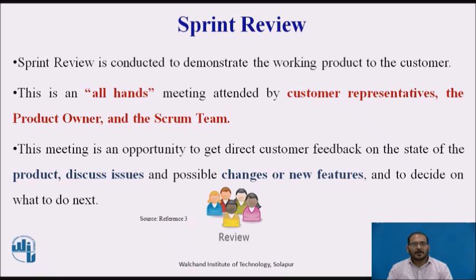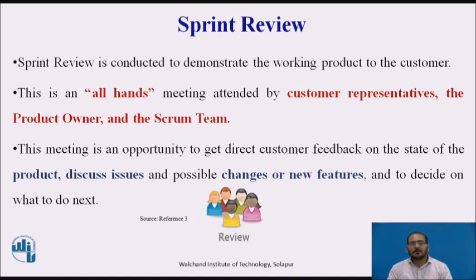At the end of each sprint, a sprint review is conducted to demonstrate the working product to the customer. This is an all-hands meeting attended by customer representatives, the product owner, and the Scrum team. It is an opportunity to get direct customer feedback on the state of the product, discuss issues and possible changes or new features, and decide on next steps. The sprint review allows the development team to receive unfiltered feedback directly from the customer and provides timely and relevant input to the next sprint planning session.